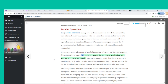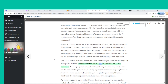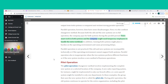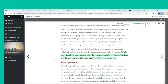Parallel operation has disadvantages: it is the costliest changeover method because both systems are in full operation, users must work in both systems, and the company might need temporary employees to handle the extra workload. Running both systems might also place a burden on the operating environment and cause processing delays. Parallel operation is not practical if the old and new systems are technically incompatible, or when the two systems perform different functions or the new system involves a new method of business operations.